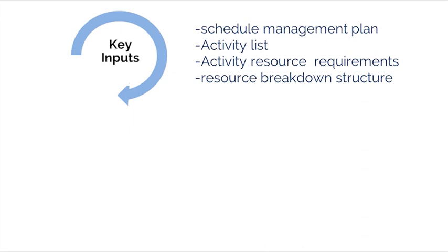The estimated activity requirements will have an effect on the duration of the activity. For example, if our plan is to assign lower skilled staff to an activity on the project, we may need to extend the duration of that activity due to training requirements as well as the learning curve. Resource Breakdown Structure. Again, this is a hierarchical structure of the identified resources by resource category. The categories could include labor, materials, equipment, and supplies, and is a useful way to organize and report resource-related data.